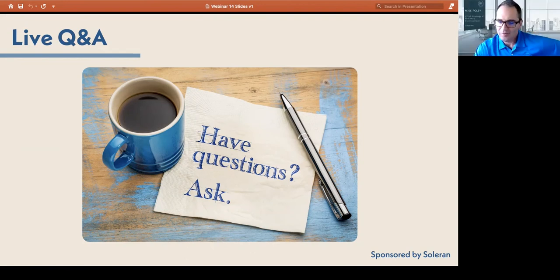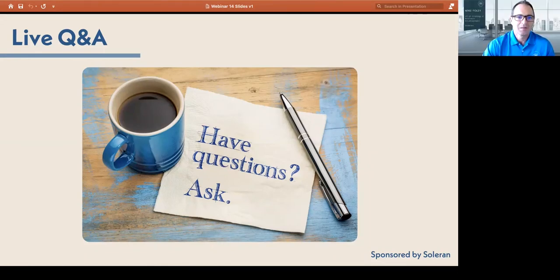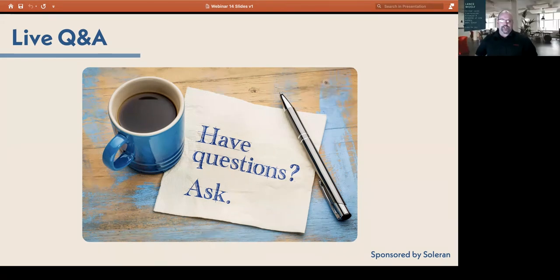Very good. And I didn't know if Billy, Lance, if you had any comment on anything related to that or not, just from your experience. I think just from our standpoint, especially as it relates to construction projects, just make it part of your pre-construction assessment before you're starting a project, to make sure that if there are any plans for any shutdowns, your vendors are aware of it and what your expectations are. Got it. Yeah, that's great advice. I agree. The more you can do mitigation strategies prior, and that should definitely be part of your PICRA, identified through there so you can start on that process, that's going to be more beneficial than a reactive type situation.